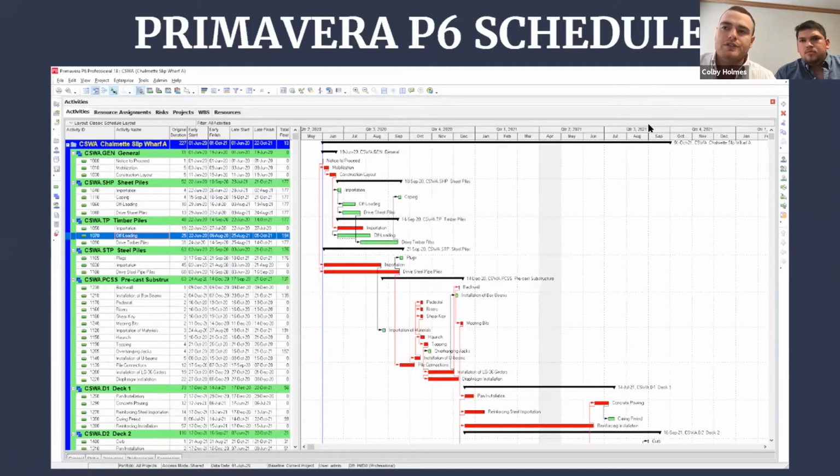That's kind of the whole reason we really wanted to go for this 4 crane thing, and we really researched it and made sure that's not going to be so much, because we figured the faster we can get that part of the project done, the rest of the project doesn't take up near as much space, and we can spread it out a little bit more than getting those piles in the ground and set.